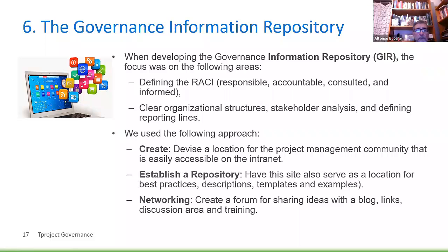Basically, we used the following approach. We created an information repository. We devised a location for the project management community that was easily accessible on the intranet of the organization. The second step was we established a repository, so this site also served as a location for storing best practices, lessons learned, knowledge management descriptions, templates, and examples. And the third step was networking. I created a forum for sharing ideas with a blog, links, discussion area, and training.